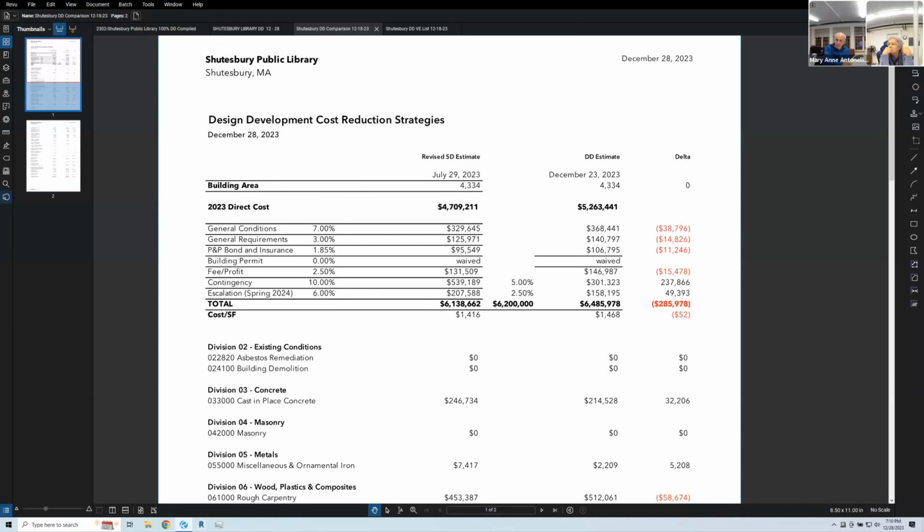So you're saying we're really 400 to 500,000 over budget? Yeah, I think we're close to that, because the numbers that you're seeing here now are just for construction. And again, I haven't really had an opportunity to dig into it, but Dominic, maybe you can clarify. I'm assuming that this doesn't have the cost of the well in it, right? That's correct. So that's 100 grand, round numbers, 75 to 100 if you want to range. And then it doesn't have design cost or any of the soft costs associated with the project. So the rest of the things that I've identified are outside of this number and were not anticipated when we updated the budget at the conclusion of schematic design. So that's kind of where we're at.